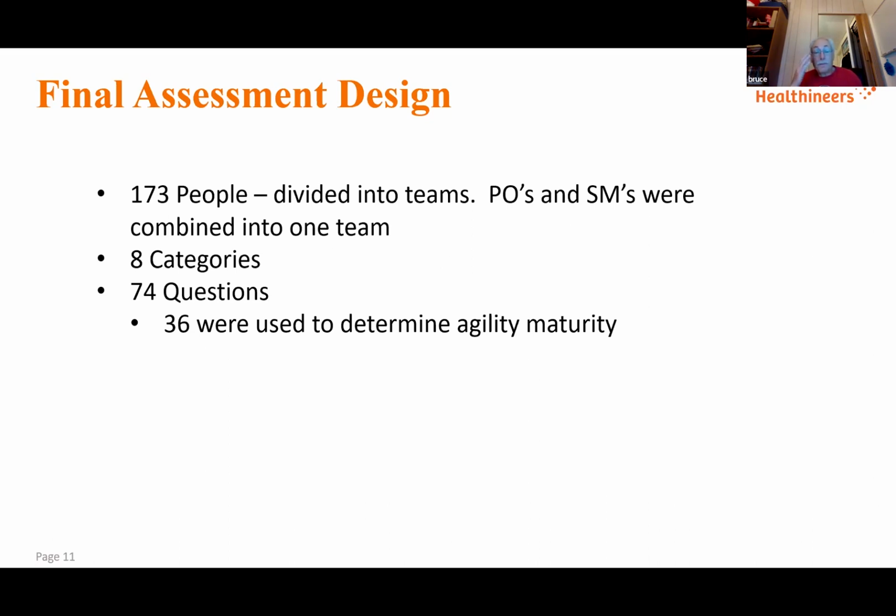And what ends up happening is we use all those 36 questions, and regardless of the questions, they were weighted the same. We weren't going to sit there and say, well, this one question is worth more than this question, is 2 times worth more, or 3 times. We could have spent 6 months arguing about that. We took 36 questions we thought were indicative of the 3 levels that we have in C, and just added them up and divided by 36, and whatever average it is, that's where we were. The remaining 38 questions, in addition to those 36 questions, we used as part of our assessments, and that's what we used when we met with the teams and we met with senior management.